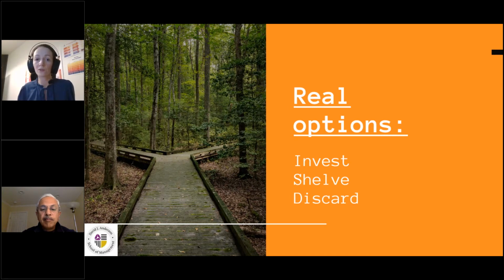The third option is the option to expand. This is a bit similar to the option to delay, so you are still negative in terms of net present value, but I think something else, expanding your project or maybe merging 2 projects, will make it valuable, will make your NPV positive. Which means that you don't delay this project, but you just start it now, but you need to expand what you are doing.